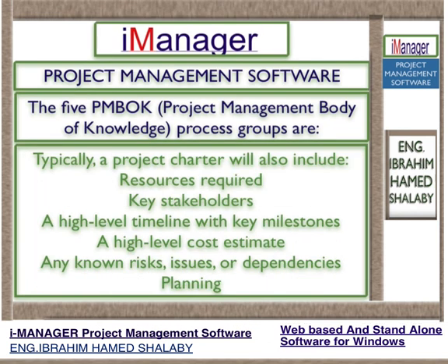Typically, a project charter will also include resources required, key stakeholders, a high-level timeline with key milestones, a high-level cost estimate, and any known risks, issues, or dependencies.